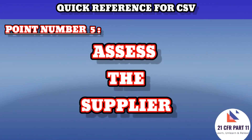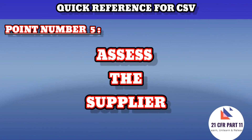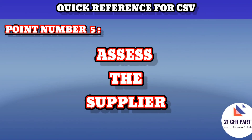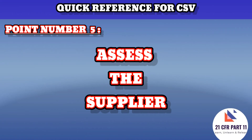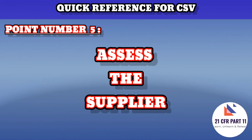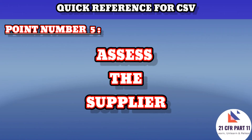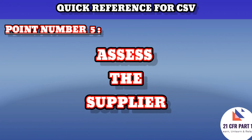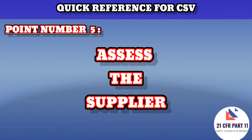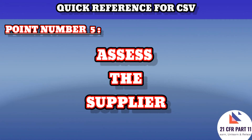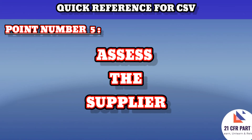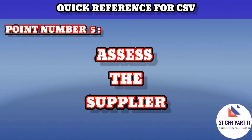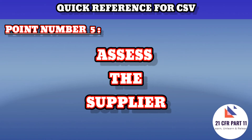Point number five says to assess the supplier. The purpose is to determine the adequacy of the supplier's quality system. The regulatory expectation per EU GMP Annex 11 says that the regulated user should take all reasonable steps to ensure the system has been developed in accordance with an appropriate quality management system. An additional benefit of assessing the supplier is that it can reduce in-house testing through tests already done by the supplier.